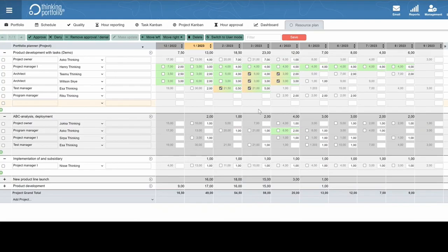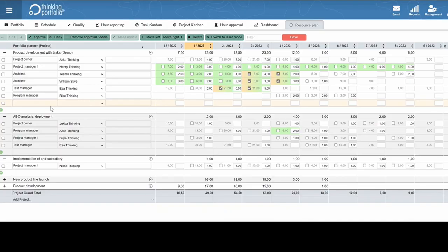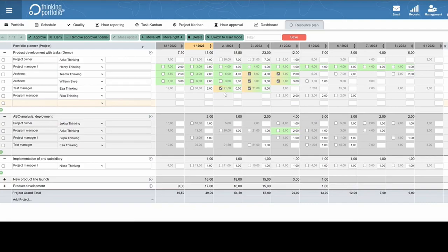And how the resource planning goes in steps is that first, maybe in proposal state, you will choose a role that the project needs, and maybe a bit of dates that resources are needed for the project. And once the project is moved to charter state, the planning state, then you will add a person, and before continuing the project, you will approve the resource plan, and then the plan is good to go. So there's a kind of 4 steps.